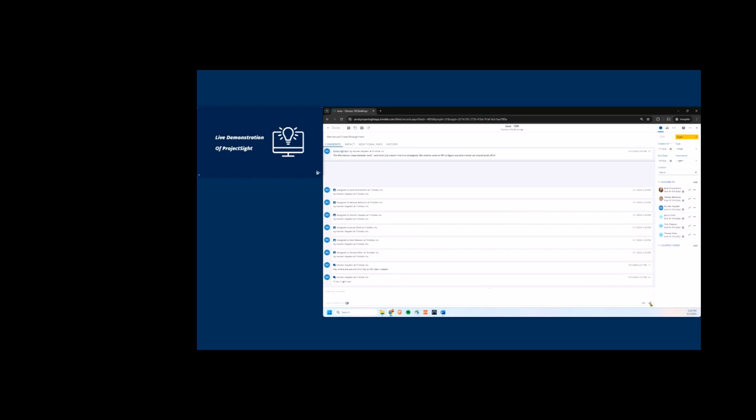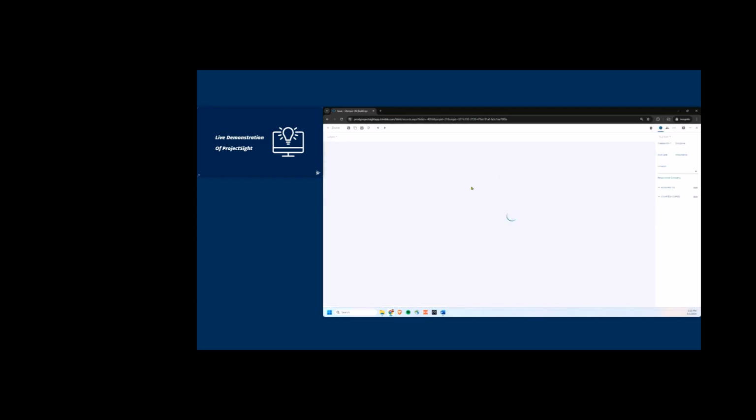So what that assistant PM can do now is jump up to our link section, press this plus button, and create a brand new RFI directly from this issue. So I'll jump to the record that I want to create, which is an RFI. Again, I can select one that's already been created, or I can create a brand new one. So I've got the brand new one created. I'll name it. I'll put some context in the question here. So the mechanical chase for gravity fan GVF1 between level 1 and level 2 at column line G is misaligned. Please clarify whether we are to build the chase according to which sheet, and please see attached links for further context. So from here, I can link those two drawings.